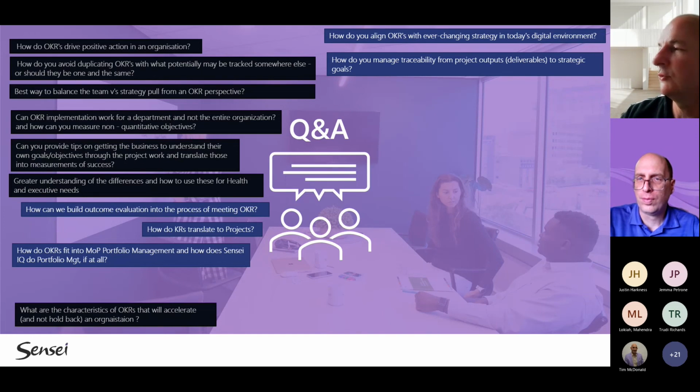Initiatives have the ability to track and accomplish these objectives, just like you would generally implement a portfolio to do benefit realization. Often I hear that this project needs to realize those benefits. Well, nine times out of 10, projects will be closed by the time benefits are realized. So projects develop outputs toward a benefit, but the portfolio generally realizes the benefit, and a portfolio could very much work the same way in the OKR sense.